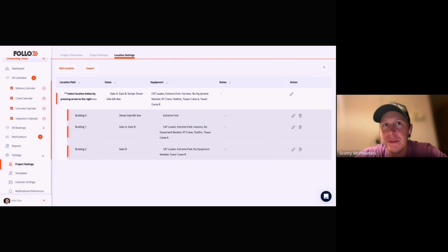No, for sure. I've been in the middle of a pretty big concrete pour in my career, and then had a delivery truck full of rebar show up. I'm in the middle of a concrete pour, and I had to have a guy jump off. It's like everyone knew, but nobody really coordinated. We knew that rebar was coming in, but I was focused on the concrete pour. The rebar guys were off somewhere else fabricating the next pour. And then this thing showed up. It's one of those things of bad communication. And now with Follo, we're solving that.